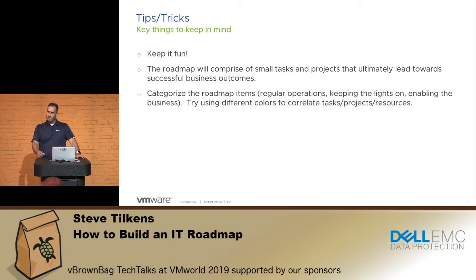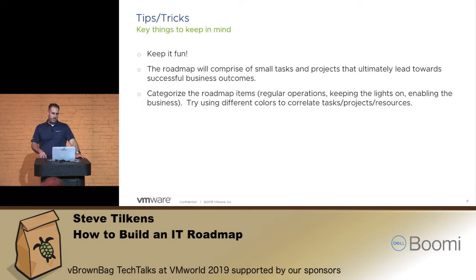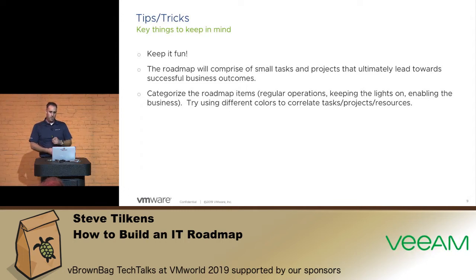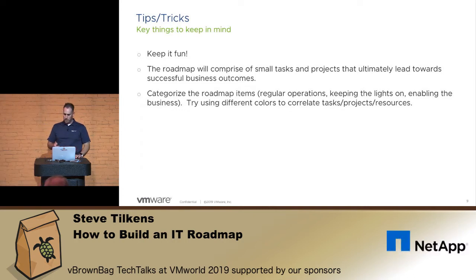You're going to want to categorize the roadmap — that's where the different colored sticky notes come into play. I typically like to do it by team if it's a relatively small IT shop: infrastructure team, database team, storage, VDI, desktop. That way the items on the roadmap correspond to who's going to be doing the work. You can also categorize by related projects, or use one color for ongoing maintenance tasks that you do regularly.